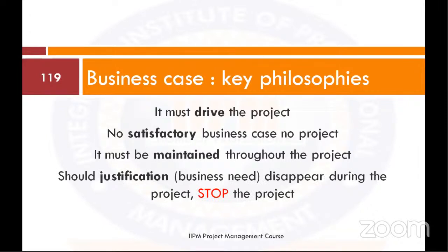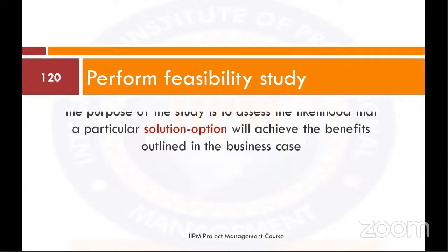Should the justification or business need disappear during the project, then the project may have to stop. Or at least, we don't want it to stop. That's why we are saying, do your feasibility first before you start. Now, how do you carry out feasibility? The purpose of the study is to assess the likelihood that a particular solution option will achieve the benefits outlined in the business case.